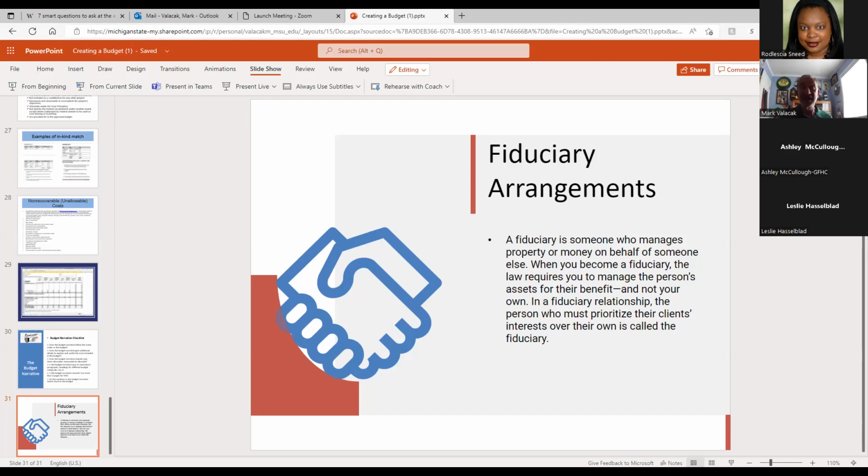Not only the nurse's time, but there's the secretary's time and registration. There's a cotton ball, alcohol, Band-Aid, medical waste disposal charge, and all these different factors that you've got to include in what the cost of a service is, in calculating those individual things when they're parts of the billing that you do, or the funding for a project, operating as a nonprofit or government agency.